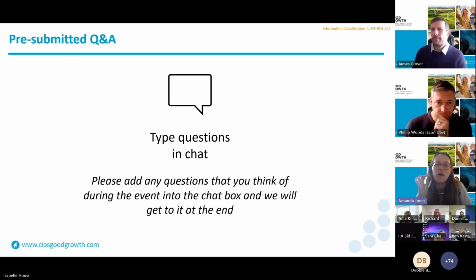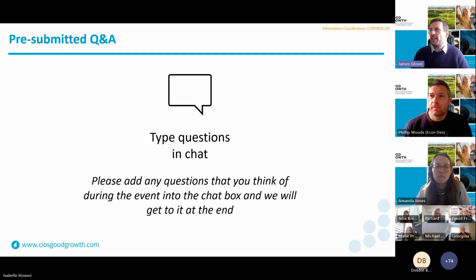So James, I'm coming to you first. Over what timescale should outputs and outcomes cover? Yeah, thanks. So these should be clearly outlined in the grant funding agreement. This will detail when output should be delivered, and progress against meeting these contractual requirements should be covered in each claim form. Where outputs or outcomes have slipped and won't be delivered in time, please notify your project lead to discuss, and a project change request may be required to agree any slippage in writing. So end date for outputs is 2025, just to reiterate that, and outcomes is 2030.